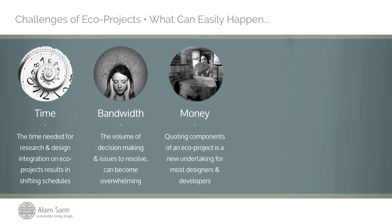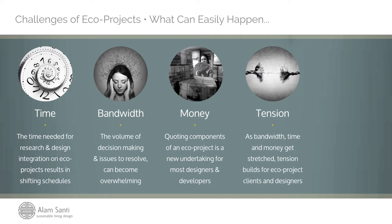Money is another challenge. A lot of these strategies are quite new and haven't been implemented by many people, so quoting what an eco strategy will cost is sometimes tricky. A lot of the components are quite unique, so integrating those into your budget is important. As time, bandwidth, and costs get stretched thin, it creates tension within the team and for the clients — and that's something important to manage throughout the process.